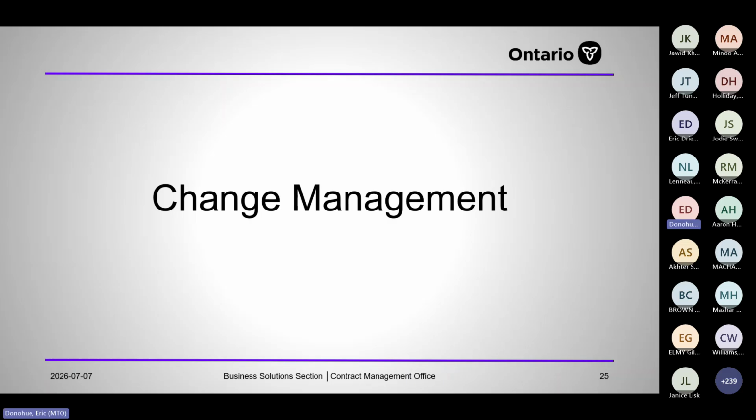Okay. As per SP, there's a timeline for the contractor review. Can CMS clock this time? No, we don't have an availability for that. We do timestamp the record as it carries through. So if the contractor comes in and actions the records, we have access to the history to view when that happened, and we can review the timestamps and see how long anything took for them to do. But no, we don't have a way for it to, say, sit with the contractor for 72 hours and then come to the CA for review. Unfortunately, that's not a functionality that's available.